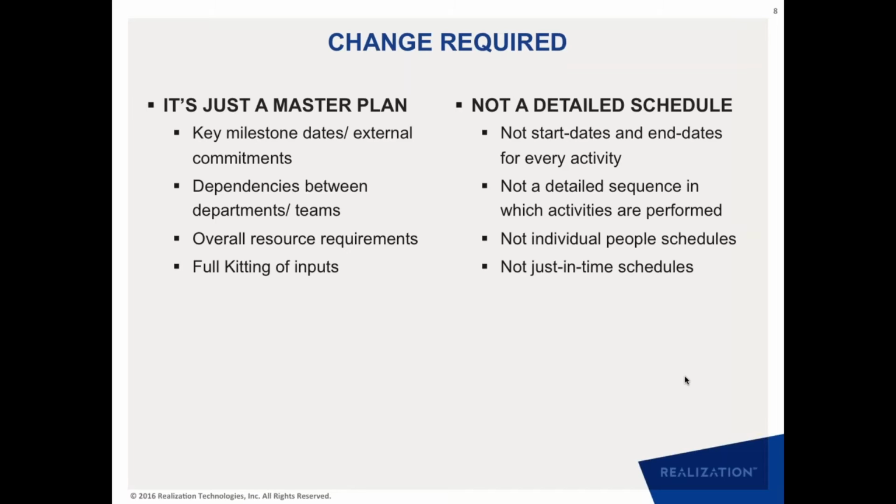Similarly, the project plan is good for managing dependencies between departments and teams, but it is not a detailed sequence in which activities should be performed. Similarly, the project plan is good for overall resource requirements in terms of how many people or what skills I need in which week, but it is not good for managing people's detailed schedules.